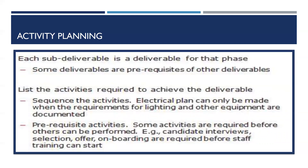Some deliverables are prerequisites of other deliverables. As discussed, there are activities and parts of the project that must be done first before you can proceed to the next step, because these deliverables are prerequisites. You cannot finish the project or proceed to the next step unless you are done with them. List the activities required to achieve each deliverable and sequence them accordingly.